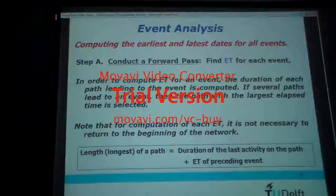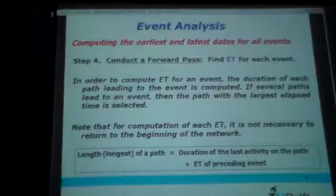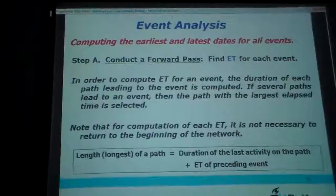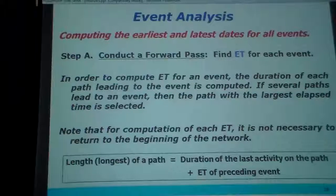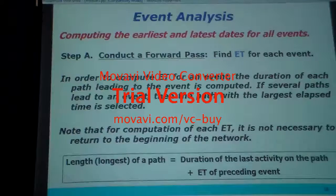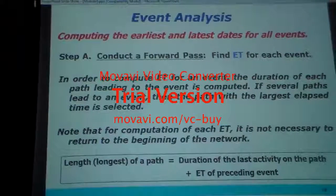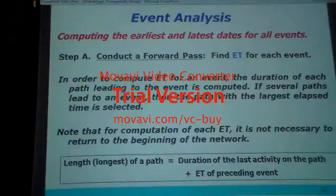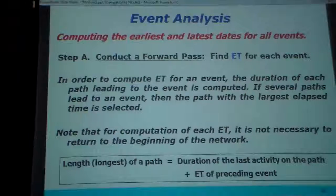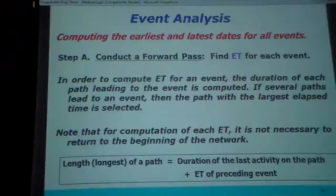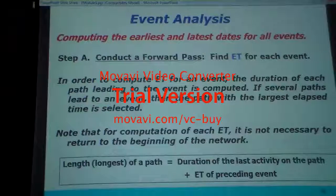Step five: conduct a forward pass — that is to find ET, the early time for each activity, and late time for each activity. We have to do like this — that's your next step. In order to compute early time for an event, the duration of each path leading to the event is computed. If similar paths lead to an event, then the path with the largest elapsed time is selected.